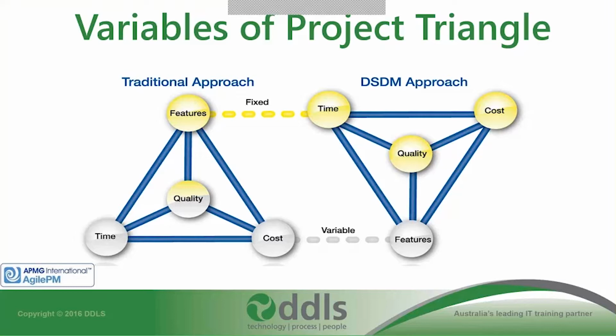So Agile still states that you are still looking at your project triangle. You're still looking at your cost, time, and your scope. You're just looking at the variable items a little bit differently. So you've got your variable items changing. And we need to keep in mind that there has to be some sort of a variable item. If you were ever given a project where time, cost, and scope is all fixed, you're pretty much doomed to fail. You need to have some sort of flexibility, and that flexibility is your contingency. You are unable to fix all components of your triangle.